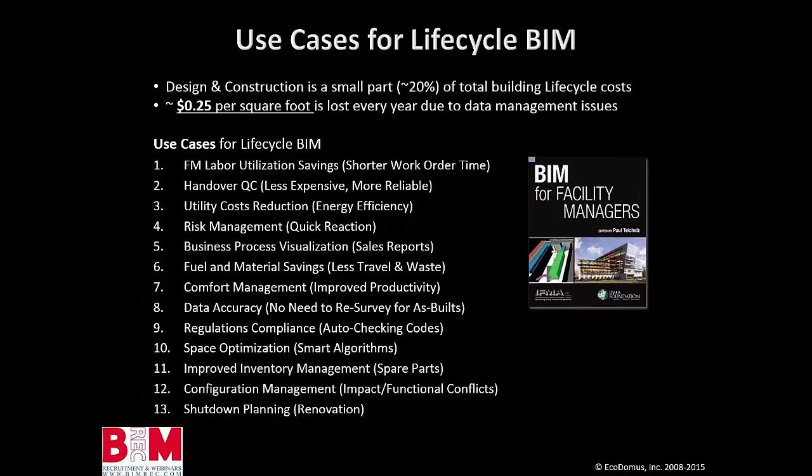Okay. Fantastic. How can the owner evaluate the quality and completeness of a handover BIM content? They can run reports, something like I showed earlier, which is understanding which documents have been assigned from the list that they've specified, or which properties have been collected and which have been missing. It's not easy to collect the data, really, because manufacturers are still not completely on board providing the data that is required. Sure. So it takes time and effort, and some of the properties that the owner may want are not even available from the manufacturer. So there will always be some data that is missing. It needs to be a process where both sides understand the challenges and are flexible enough to work together.